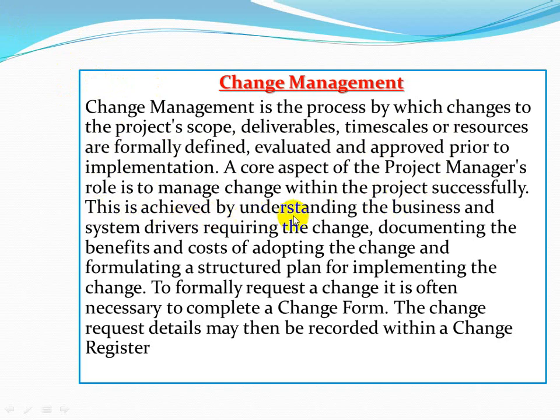This is achieved by understanding the business drivers requiring the change, documenting the benefits and cost of adopting the change, and formulating a structured plan for implementing the change. To formally request a change, it is often necessary to complete a change form. The change request detail may then be recorded within a change register.